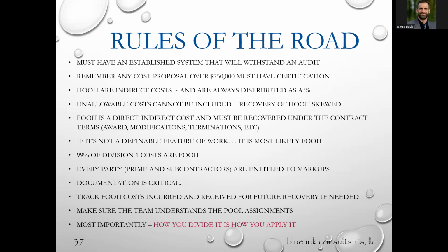Indirect rates are always going to be, remember, we talked about G&A, home office, indirects, they're always going to be distributed as a percentage. That is a cost of doing business, and it's distributed to all dollars or all revenue or all hours to all clients. I spread all of those costs equally. The government, although the government disallows certain costs, the principle is that all of your overhead expenses are charged equally to all of your contracts, dollars, and products.